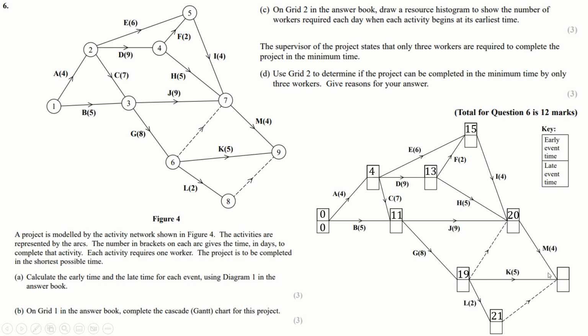A couple of ways to get here, either 21 plus 0, 19 plus 5, or 20 plus 4. They actually both equal 24. So that's the forward way done. We'll copy that number there, and then backwards, exactly the opposite. We're going to go for the smallest number we can get.